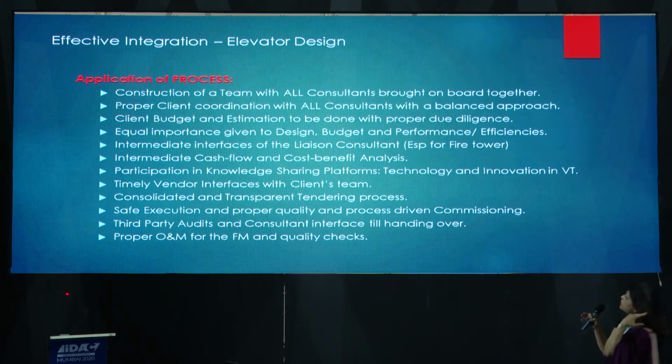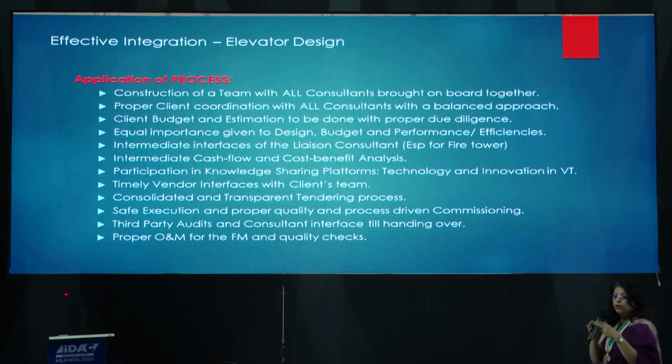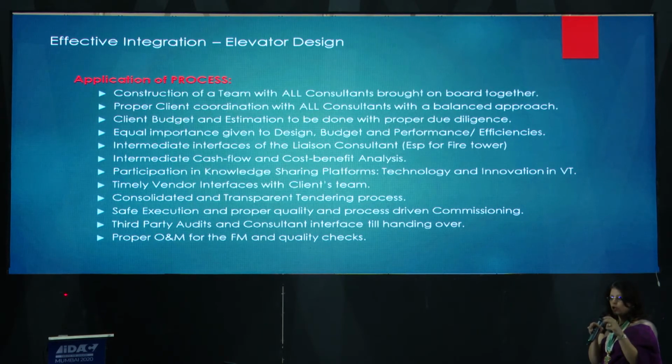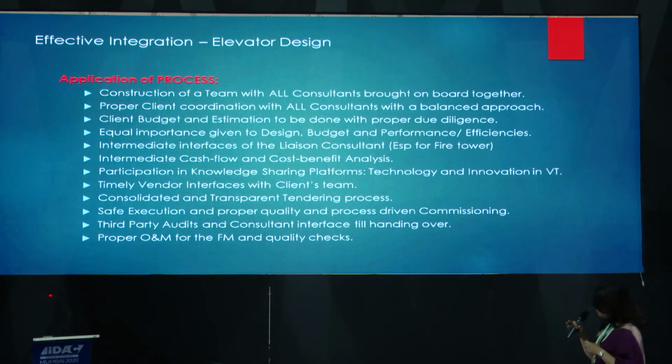What is also important is intermediate cash flow and cost benefit analysis, because in large projects, sometimes you have overruns, sometimes you haven't thought of certain things, and most of the packages go through value engineering. And when you are doing value engineering, a product like vertical transportation has to go through a certain kind of analysis and not just a quick pick and drop.